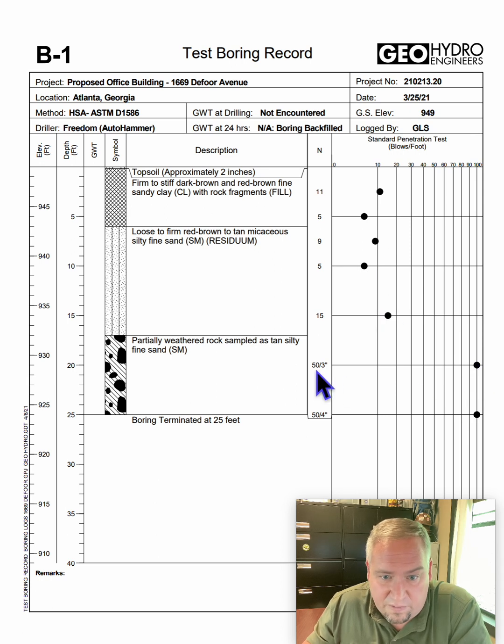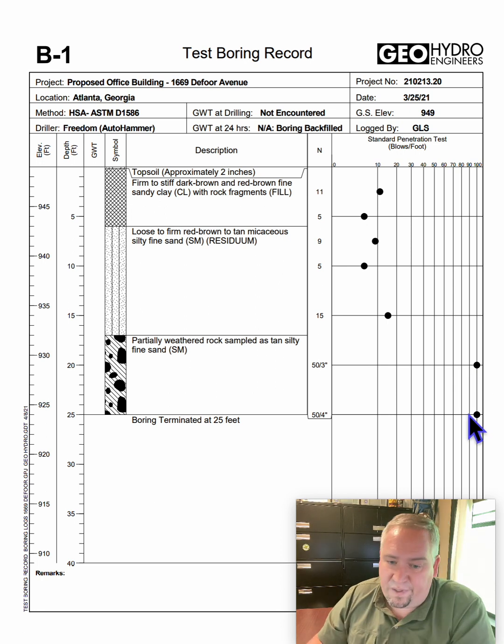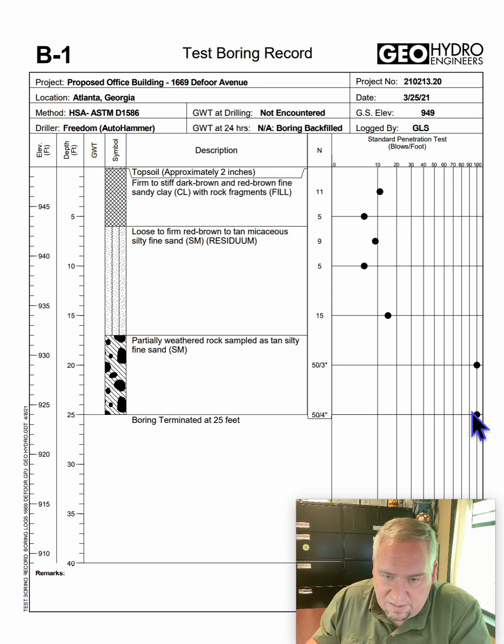You can see here, look, they hit this one, it started tightening up. So you're going to have to hammer that stuff or blast it. This stuff is not going to be scratched out likely when you're hitting that many licks.